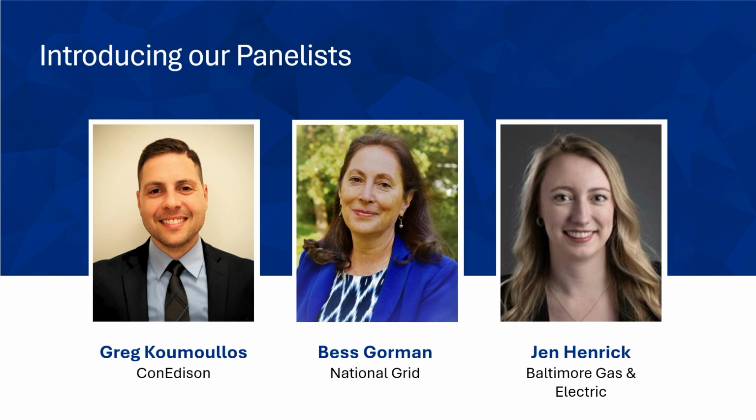Thank you. I'll go quickly on, for instance, our Chelsea project. We're connecting one data center with some housing. That area has a lot of data centers, including a Google headquarters. So we're putting T's and valves in place, ready to connect future customers when they come, right? We want to limit redigging the streets up. That's expensive. We're oversizing the mains of our Mount Vernon project. We're allowing for our energy center buildings to have more capacity to put additional pumps in for future uses. So those are some of the ways you do it, but you have to find balance, because the cost of these projects may cause them not to get approved. So you've got to thread the needle between being ready for expansion, but also not overcosting the projects where our regulators won't approve them.